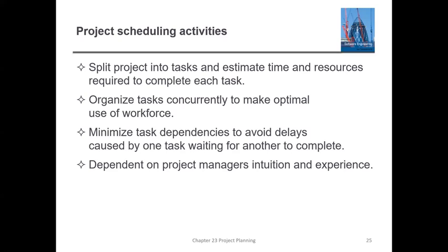It is not difficult, but you should understand how you are going through the project scheduling activities. Now here I have some of these schedule activities. If I have a master project schedule, the first thing I have to do is split it into tasks. Once I split it into tasks, those tasks are also a kind of modules. If I split into tasks, then I can estimate the time for each task, and I also have to estimate how many resource persons I need to complete the task.